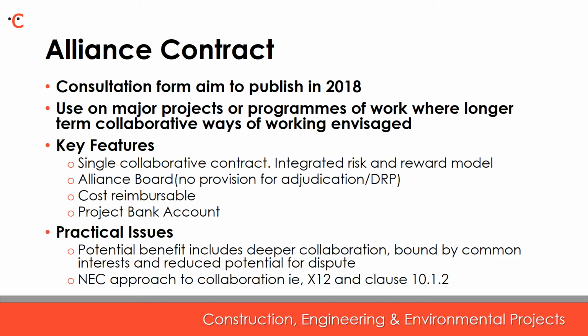Whilst the NEC contracts generally allow for all members of the supply chain to be engaged on similar terms and conditions, they are usually, of course, bi-party arrangements. As such, historically, NEC contracts have been transformed into an alliance arrangement using secondary options such as option X12.